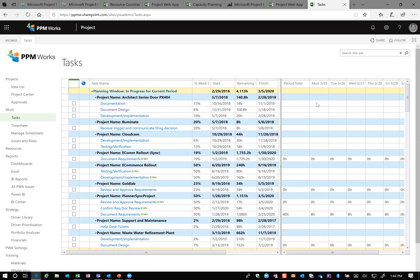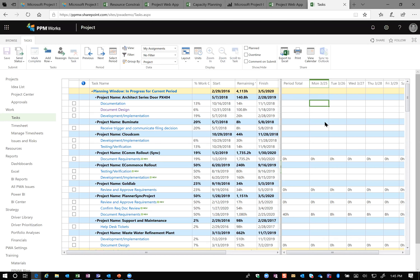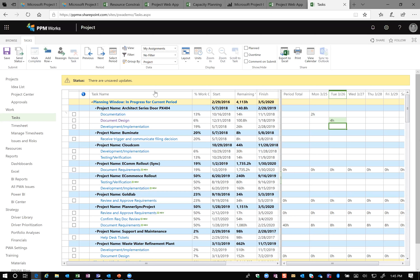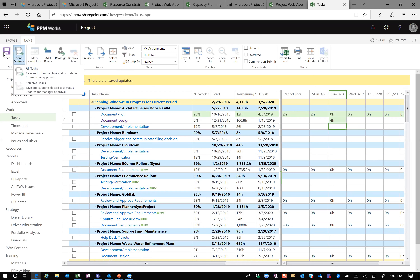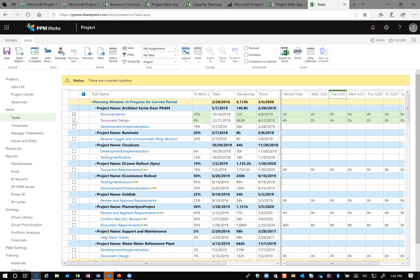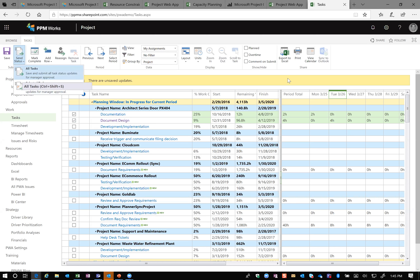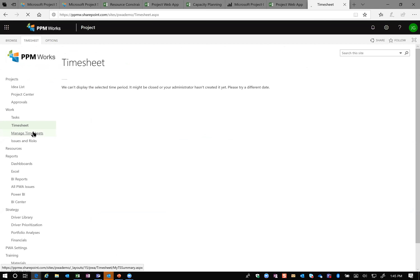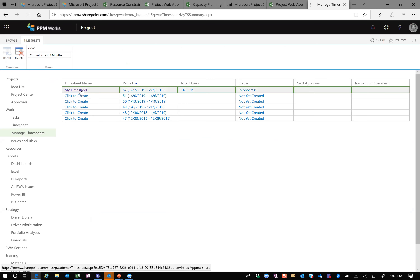Drilling into a task like 'Design Document' shows its details, history — if someone made changes, it creates an audit trail — and who the approvers are plus dependent tasks. In typical use, you come in for a time period and enter hours: two hours here, four hours there. After adding entries you'll see unsaved updates, so you save them and can then send the update to your project manager. You can submit updates for specific tasks on a given day or wait until Friday and submit everything at once.